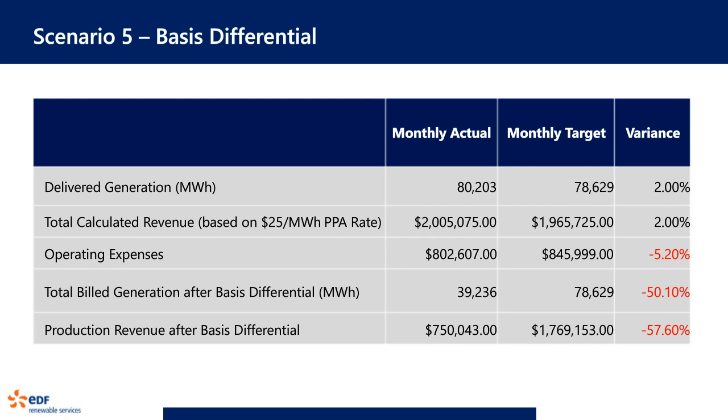So I think as ERCOT in particular matures as an ISO, and we start to be able to see congestion trends in the Panhandle in particular, we're able to model basis differential more accurately. And so if a project does take on that risk, I think the most important thing to do is to really have conservative assumptions in your model so that when you have months like this where you're having such low production, it's not a surprise.